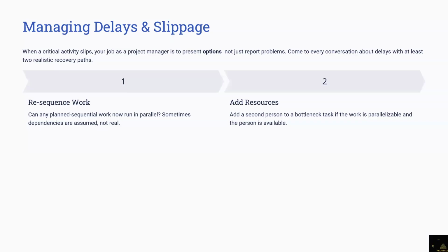We proceed with doing this work with these additional resources and at this additional cost. Thank you for the approval. You just send that email, so that something is documented. You can just ask at the end of the email, please, can you let us know if we can proceed? And you wait for that response to come back.